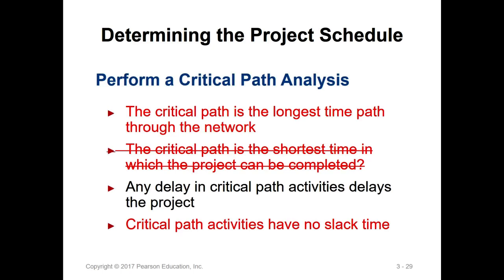Any delay in a critical path activity delays the project. And also we see critical path activities have no slack time. That means the slack time is 0. So we will give you a definition of what slack time is when we do the analysis.